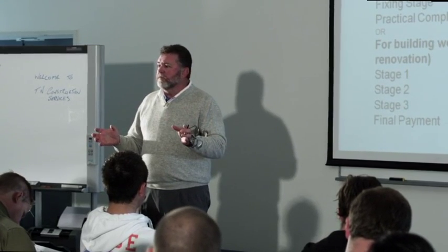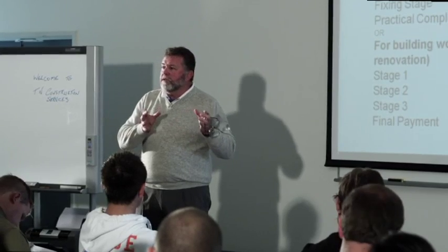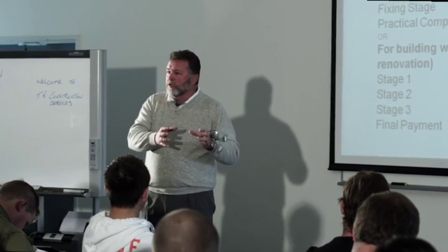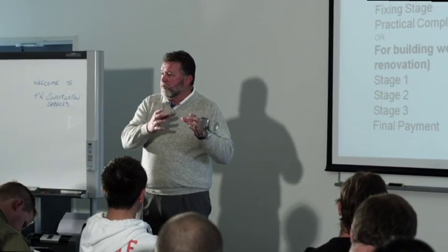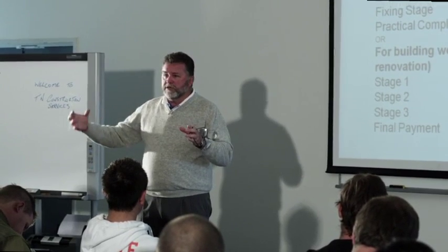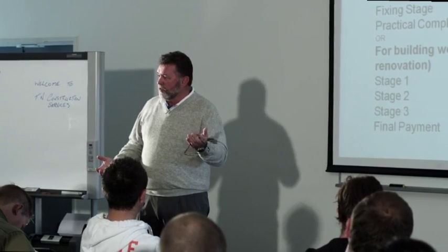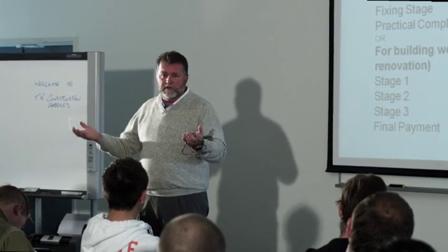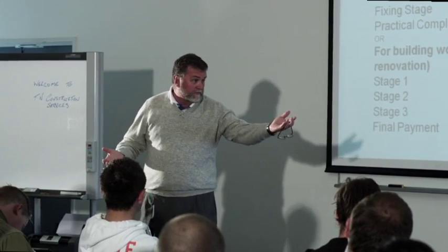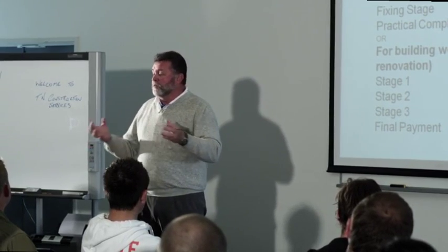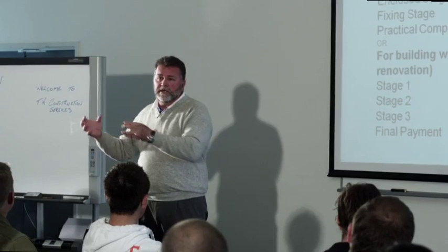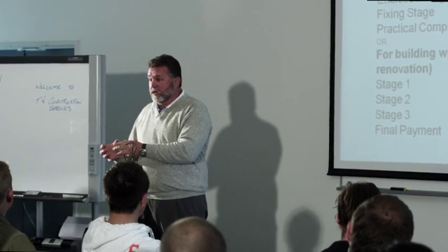Why would I suggest that? The reason would be that if you've got to do work for the pool and there's something that goes pear-shaped with it, it doesn't affect the duration of the contract for the house. You can have a special condition in the pool contract that the housing contract does not commence until the pool shell is in. So in actual fact, you can split it, or you have the other option of making it part of the special conditions in the head contract.